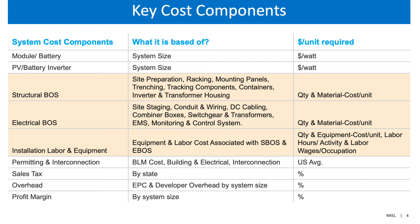For example, a DC-coupled energy storage could have different sub-activities compared to an AC-coupled energy storage. At the bottom of the slide, below the highlighted area, are the soft costs, and these soft cost estimates are usually gathered from industry interviews or from third-party research firms which have published their quarterly reports.